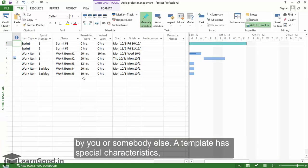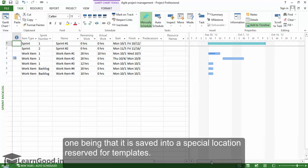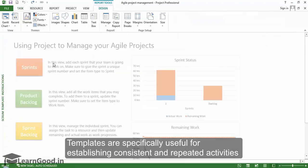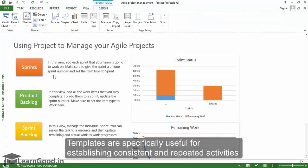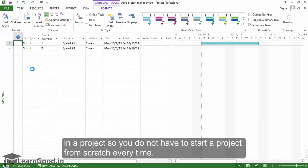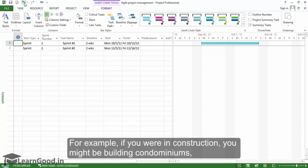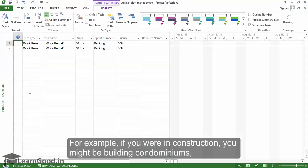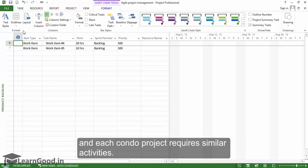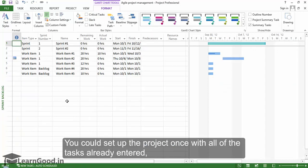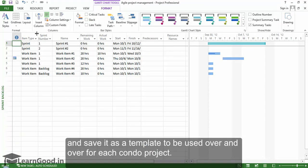A template has special characteristics, one being that it is saved into a special location reserved for templates. Templates are specifically useful for establishing consistent and repeated activities in a project, so you do not have to start a project from scratch every time. For example, if you were in construction, you might be building condominiums and each condo project requires similar activities. You could set up a project once with all the tasks already entered and save it as a template to be used over and over for each condo project.